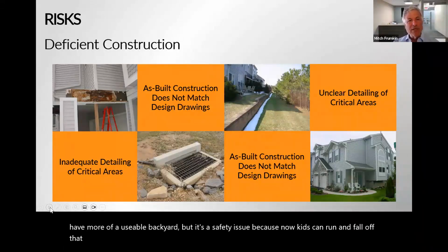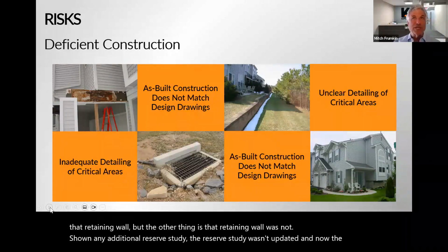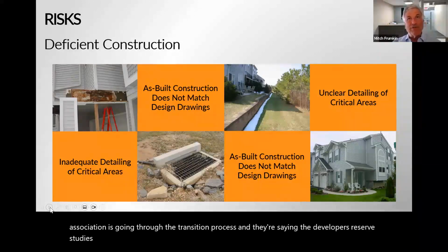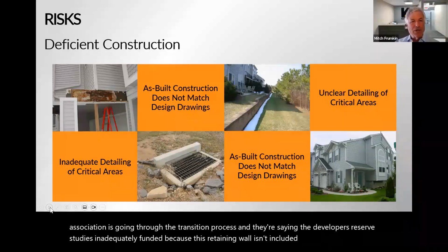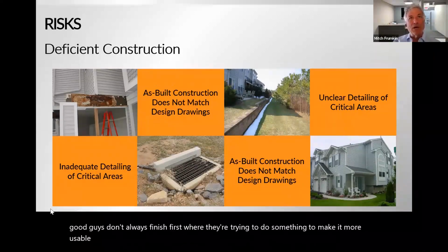But the other thing is, that retaining wall was not shown in the additional reserve study. The reserve study wasn't updated. And now the association is going through the transition process and they're saying the developer's reserve study is inadequately funded because this retaining wall isn't included. So it goes to show that good guys don't always finish first, where they're trying to do something to make it more usable, but it runs into a problem later on.